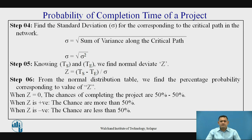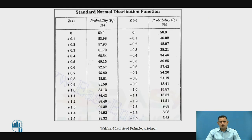Finally, knowing ts (scheduled completion time) and te (expected completion time), we can find the normal deviation z using the formula: z = (ts - te) / sigma, where sigma is the standard deviation. When we get the normal deviation z, we use it to find the probability completion time of the project in percentage by referring to the standard normal distribution function table, which lists z values along with the corresponding probability completion percentages.